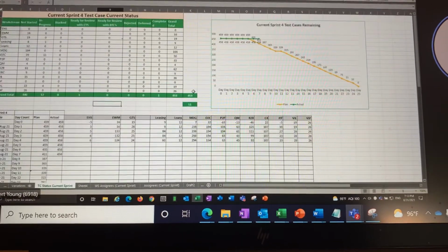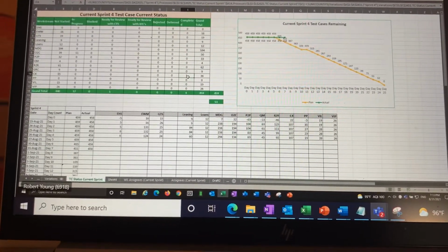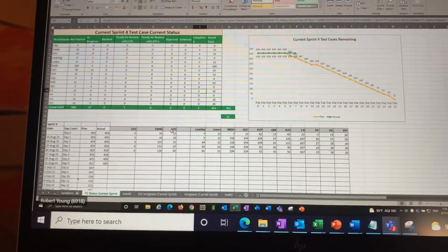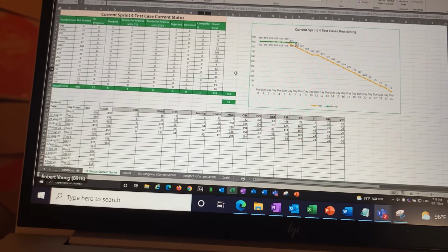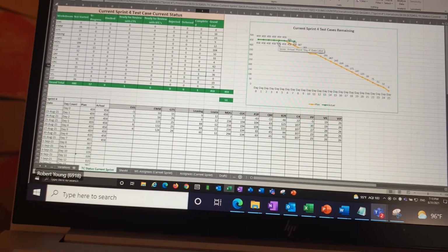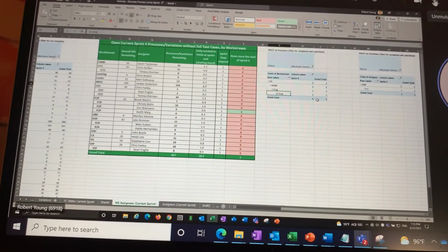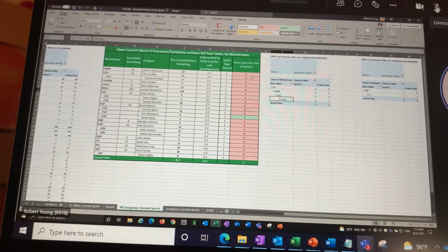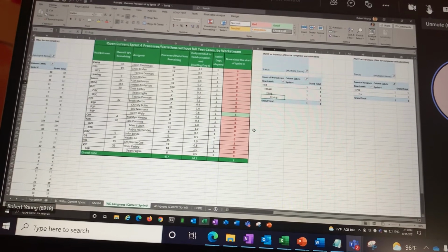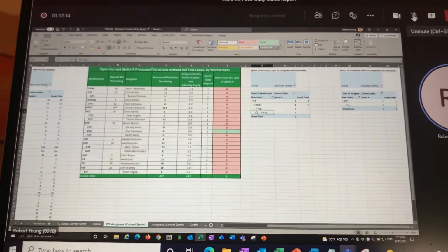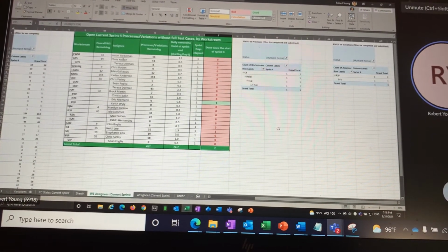So that answers the question, well, why does it show 458? It's because this C41 that Heidi did was done before we started the sprint. So the plan is for a total of 459, but the actual is 1 less because we already had 1 prepared before we started the sprint. Okay, so that's the answer for that. So we just need to record here, done since, to make the numbers match. Even though this is done in early August, we still have to report it here so that the numbers match, right? 457 plus 2 is 459.